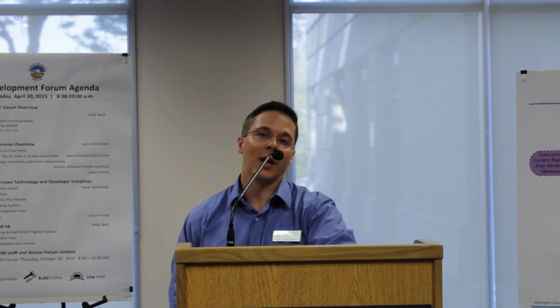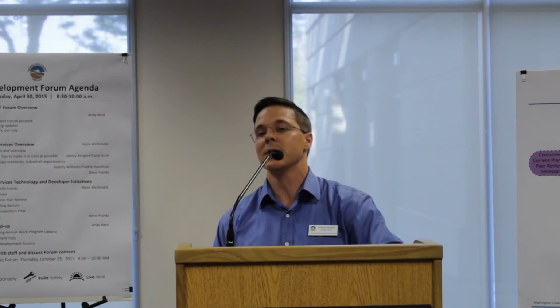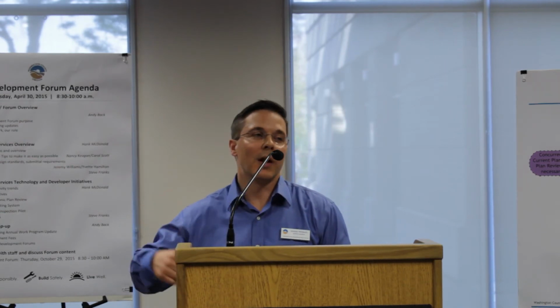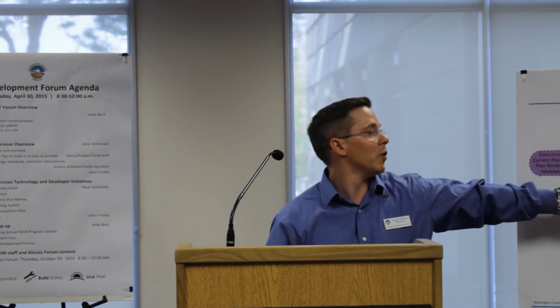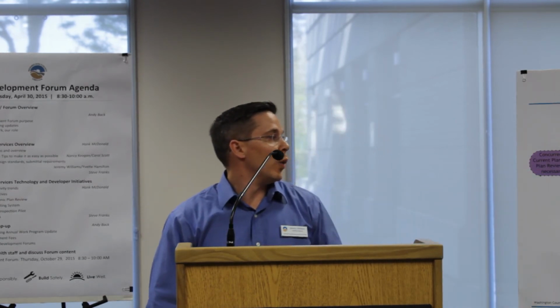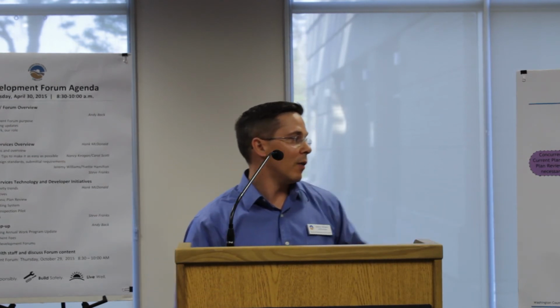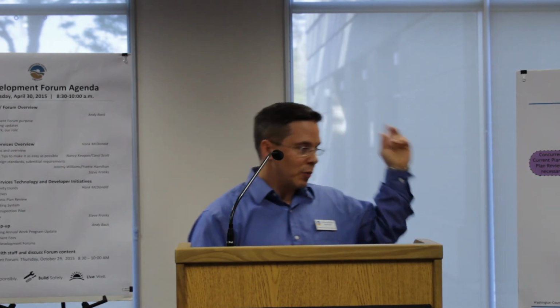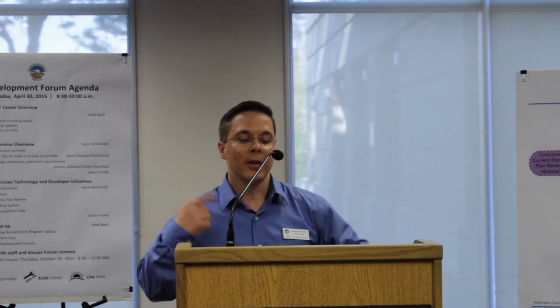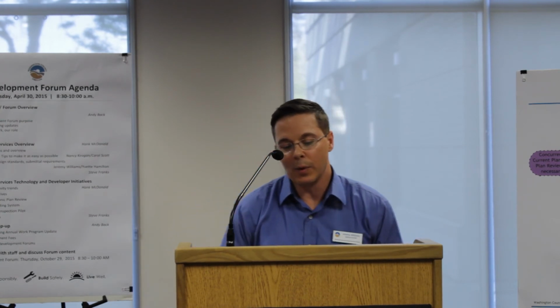Outdated codes used for design, we can't review anything where the wrong codes are used, so we have to stop the process. And when I say stop the process, that's basically an incomplete right at this point, and we wait until we get the complete submittal, which could take however long it takes for you to get the plans back in, and then it goes back through the normal queue cycle. So it really could delay things when it shouldn't have to.